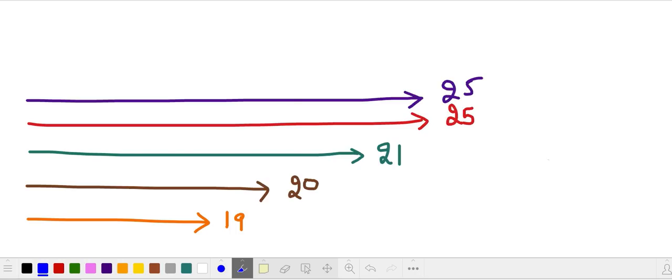Welcome back. So now we're going to talk more about the critical path. I really want you to see the screen and just think about which can be the critical path. You know what? You're right here. So this one will be completed in 25 days. This is our critical path. And this one is also taking 25 days, the longest time it is taking to complete. This one is a critical path too. So we can say it's going to take 25 days to complete this particular project.